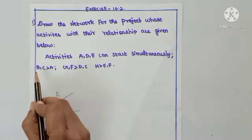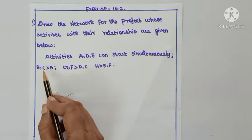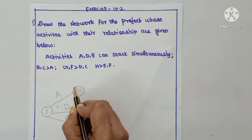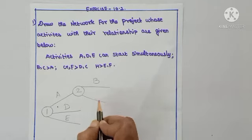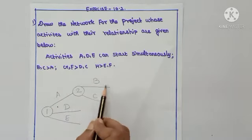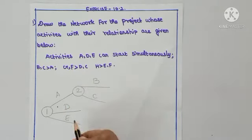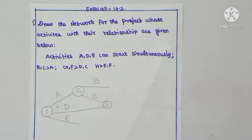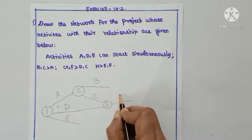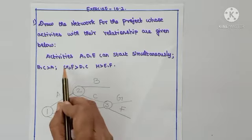Next: B and C come after A. So after A we mark event number 2, from which we have two activities — B and C. The next idea: G and F come after C and D. So we connect C and D to the next event, numbered 3, from which G and F are drawn.